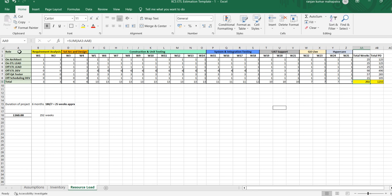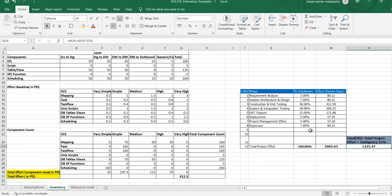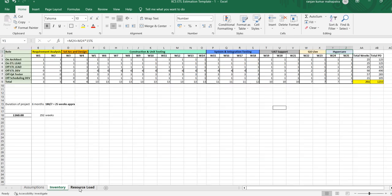If you go to the resource load, you can see I have mentioned week one, week two, week three, and up to week 25. During all these 25 weeks, I have mentioned the phases of the project: starting with requirement analysis, solution architecture and design, construction and unit testing, then SIT, UAT support, go live, and hypercare. Based on this percentage distribution, I will be calculating the effort. I have put two weeks for requirement analysis and two weeks for solution architecture and design.